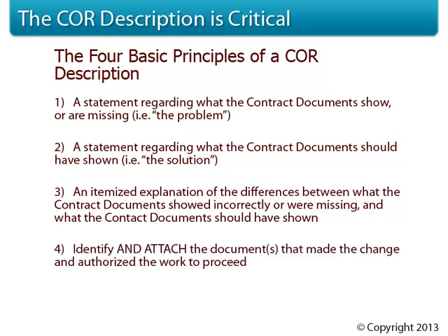And lastly, we need to identify and attach the documents that made the change and authorize the work to proceed. This is important. Don't just reference an RFI or ASI from the description. Attach them. We don't want the reviewers to have to go looking for these documents. We want them right there with the change order request.